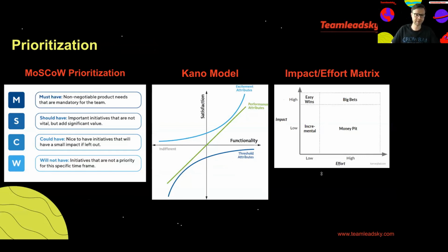The way it works for me is to use them, when necessary, not always, using the Kano model to identify the items for different buckets of prioritization, and then looking at the perceived impact and effort to determine the sequence in which we are going to develop the items.